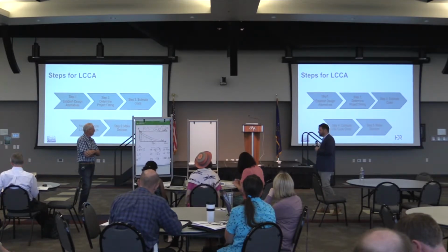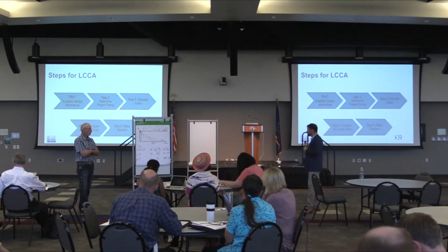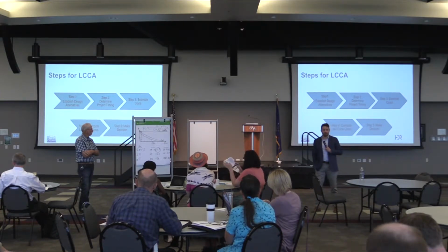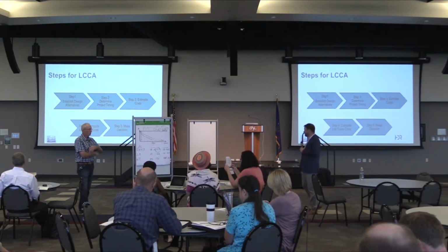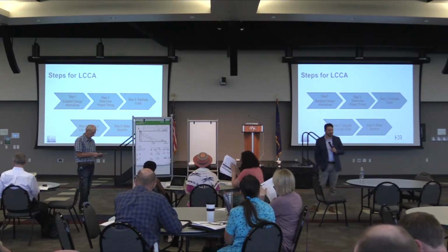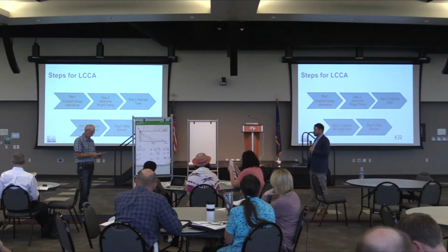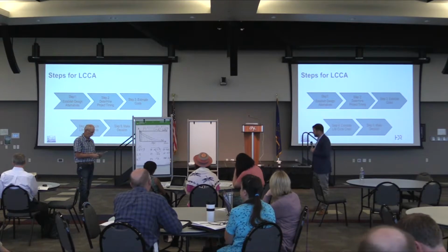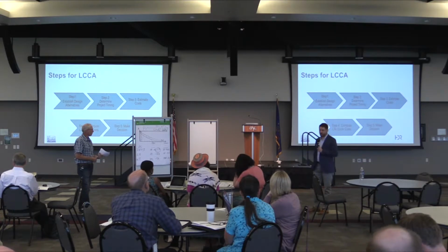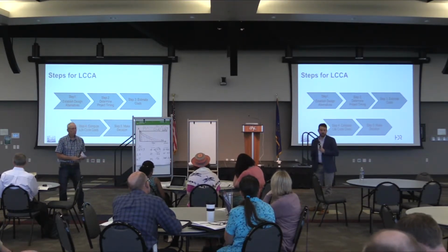So, steps for conducting the LCCA. Again, this is covered in the guidance here. First, you're going to establish your design alternatives. The model's set up to handle four of those. When you go through and define what those alternatives are, you're going to look at whether you're doing a regional distribution system or whether you're going to upgrade your own system. You would look at the different aspects that you would need to complete the project, what the various elements would be, and determine what the timing of those elements would be, when they would occur.